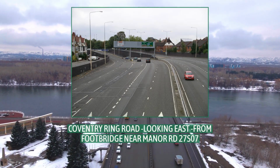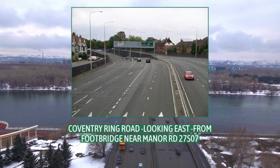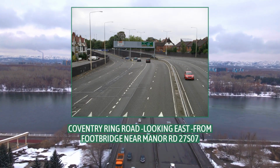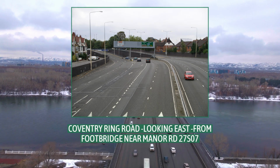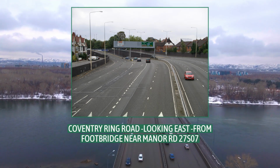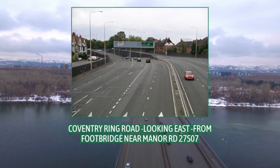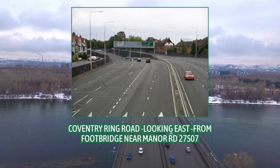In response, the council proposed changes affecting the Ring Road, including a redesign of Junction 7 and a new link between the Junction 8 clockwise exit Slip Road and Upper Hill Street. The goal of the latter change was to avoid a bottleneck on Holyhead Road for Ring Road traffic destined for Cowden Road, but this was in doubt due to the need to acquire land and opposition from a primary school on the route.